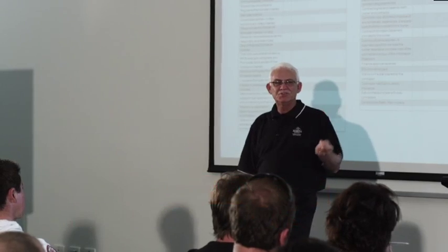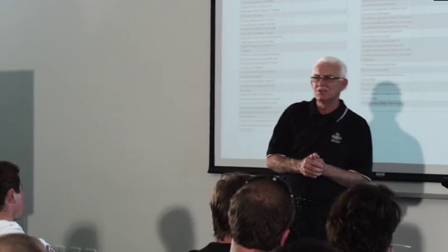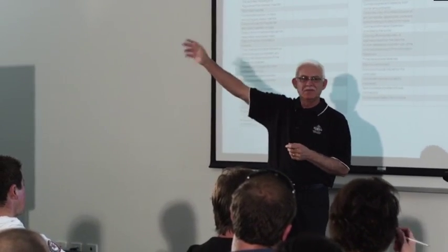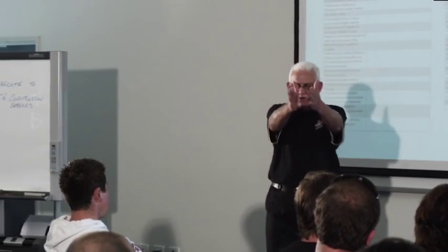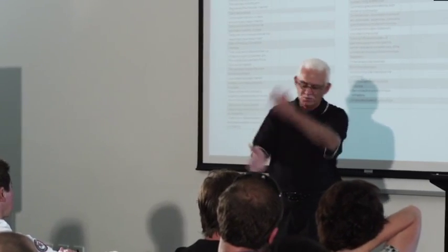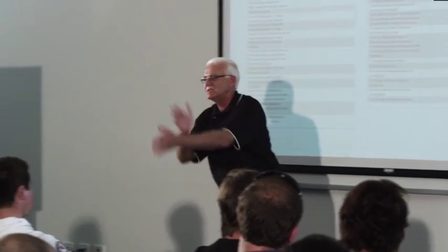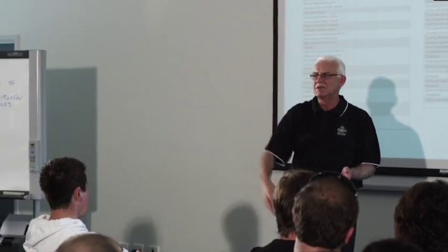Why should you suffer? Because you've gone out, Mr. Owner, and selected tiles from Italy and they're bubbling around the ocean somewhere and I can't do any work. I've had all my contractors programmed in: the electrician will come on one day, the tiler on the next, or the waterproofer, then the tiler, then the painter, and so on. You've just stuffed up my program because these tiles that you've chosen are way out there.